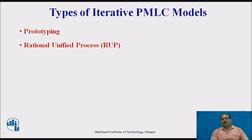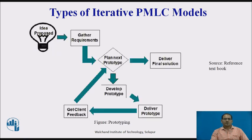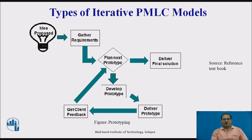The types of Iterative PMLC Models are mainly prototyping and the Rational Unified Process. In the prototyping model, requirements are gathered from the client, a prototype is developed and delivered to the customer, feedback is taken from the client, and a plan for the next prototype is developed. Once the iteration is completed, the final solution is delivered for the project.